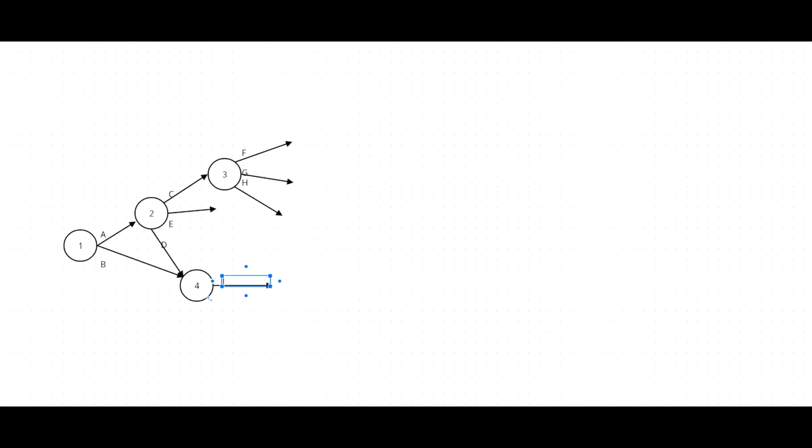The next, K, we should complete FJ. Here the J, here the F. We should take the F this side. There should be the forward process, backward not allowed.